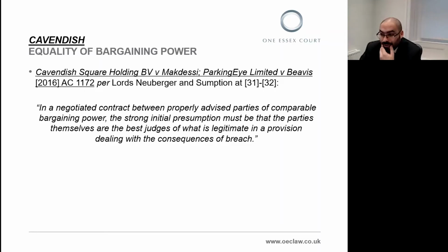One final point to make about the judgment is the emphasis placed on equality of bargaining power. Lords Neuberger and Sumption said that in a negotiated contract between properly advised parties of comparable bargaining power, the strong initial presumption must be that the parties themselves are the best judges of what is legitimate in a provision dealing with the consequences of breach.